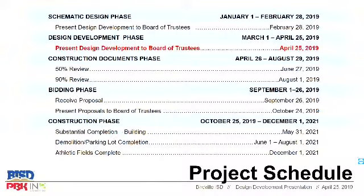After that we go into our bidding phase, with proposals received on September 26th, going back to the board on October 24th. After that, we will enter the construction phase on October 25th through December 1st, with substantial completion of the building ending May 31st, demolition of the parking lot completion between June 1st and August 1st, and the athletic field completion on December 1st of 2021.